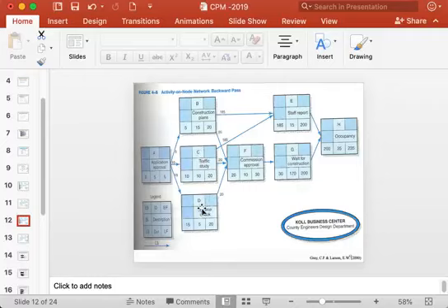Again for activity D, the following activity is F, and the latest start time by which activity F must start is 20, so D must finish latest by 20 days, that is why 20 here. Then accordingly you can find out the latest start time for B, which is 20 minus 15, 5; for C, 20 minus 10, 10; for D, 20 minus 5, 15 here.